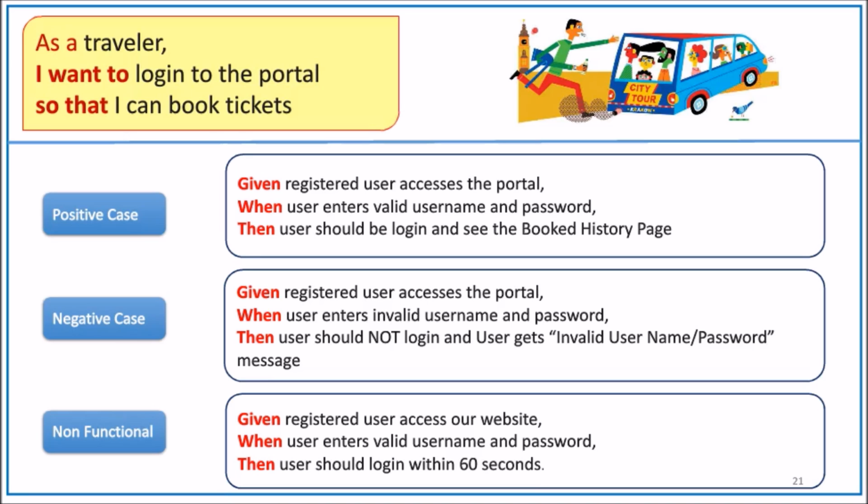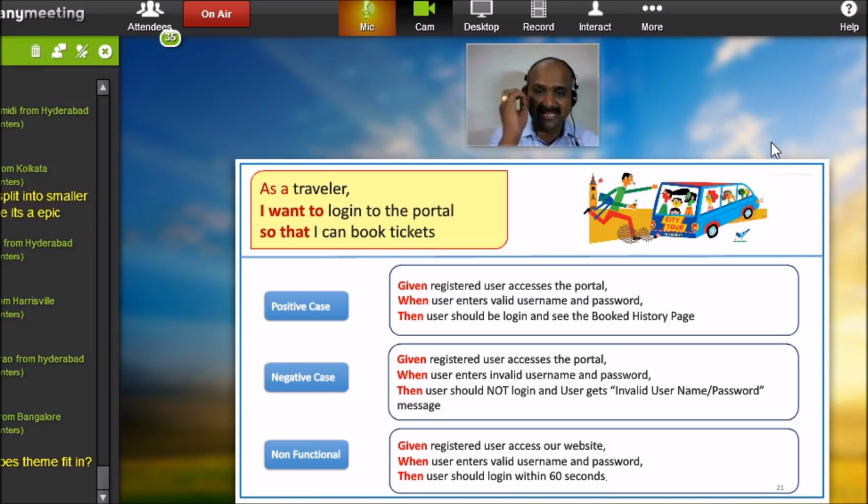So my dear friends, see here. First, I want the acceptance criteria in the expected scenario. There's a positive case, expected. What are the expected cases for me? What are the positive parts for me? Then second is the failure scenario, negative cases, when my use case or my user story should fail. The third one is non-functional, meaning performance related or scalability related things.